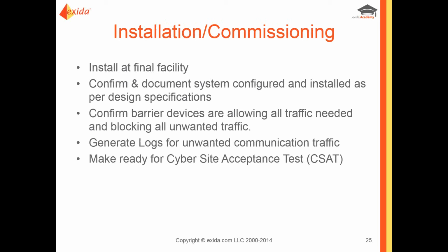After that, the equipment arrives on site, it's installed, it's commissioned. As part of commissioning, you'll confirm that it's configured and installed per the specs. You want to make sure that barrier devices only allow the traffic that is needed and that they block any unwanted traffic.